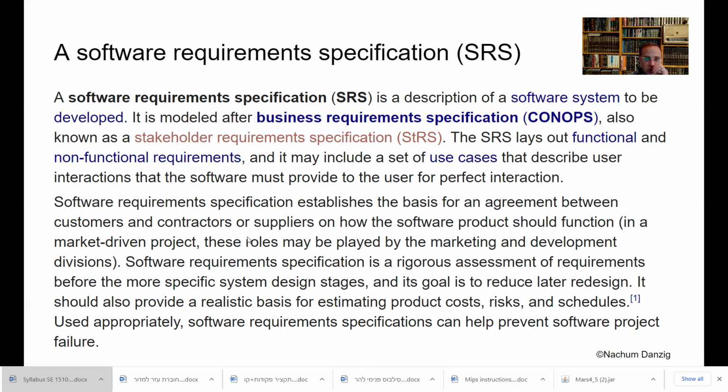Now, they're going to pay me money to make this, and I'm going to make it according to these requirements. And I may build in, you can have 3 changes of this amount of code lines, and anything more, you have to pay $1,000 a change. It'll be a contract that says what, because otherwise the client will just say, oh, no, I want this. Oh, I want this feature. Now I want one more feature. Say, wait a second. In the beginning, you said you only wanted these features. That's all you're paying for. So you may allow him an extra couple features, but you'll have a contract.